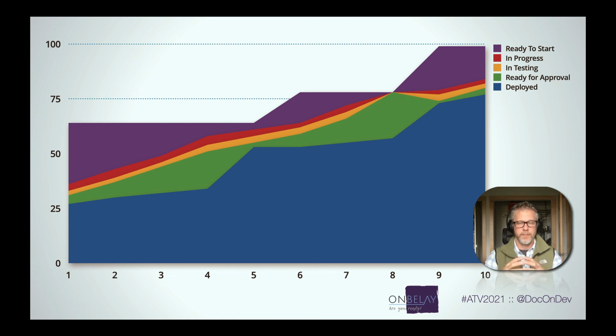And it turned out that when we looked at the broader system, when we stopped focusing in on the team, we discovered that, hey, it's not a team issue. It's not on the delivery team so much. It's broader, right? Their product owner is a traveling salesperson. And when they're on the road, they don't have time to review stories. Stories that aren't reviewed don't get approved. Stories that aren't approved don't go to production.